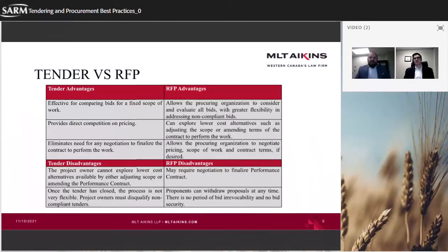It basically has this notion of irrevocability and the necessity for contractors to provide what they're presenting within their proposal. And then we have a non-binding process that is a little bit more flexible, has a little bit more ability for the owner to clarify, negotiate, and make up some more rules within their procurement strategy. Both the binding and non-binding processes are subject to the trade agreements, which Andrew is going to address a little bit later on in this presentation.